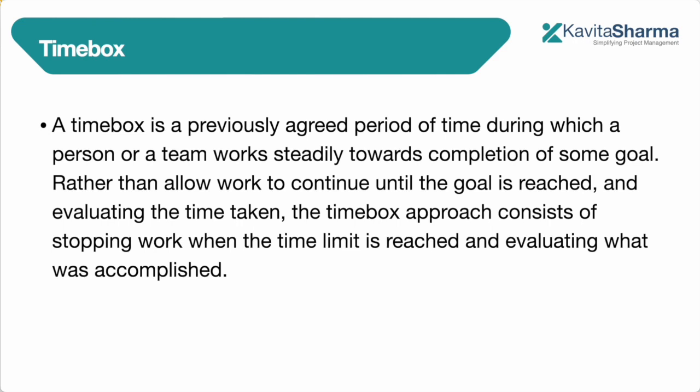Let's talk about time box. What is a time box? A time box is a previously agreed period of time during which a person or team works towards completion of some goal. When the time box reaches, if you have a time box of two weeks, if you finish the two weeks, we do not extend the time box if the work is not done. We close when the time limit is reached. We evaluate what was accomplished.